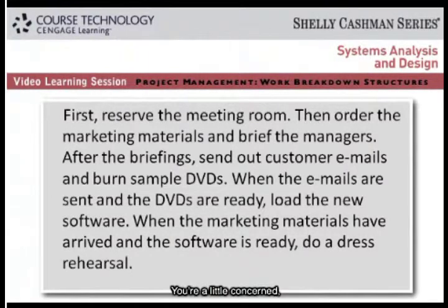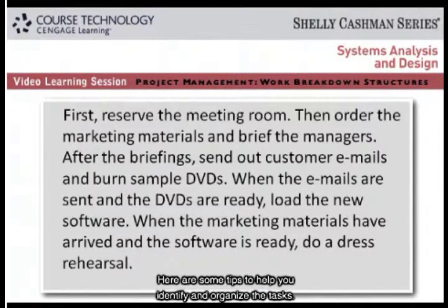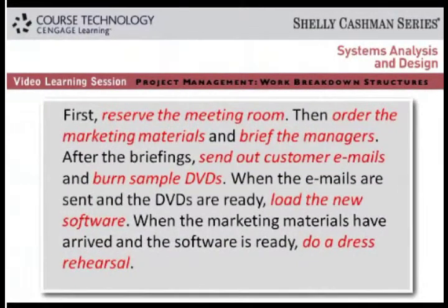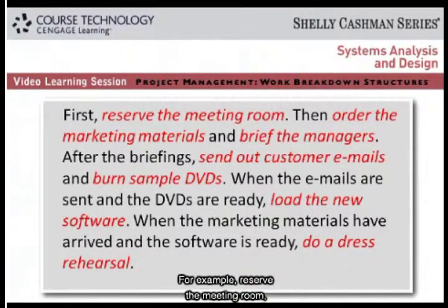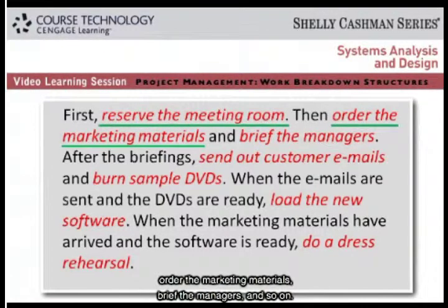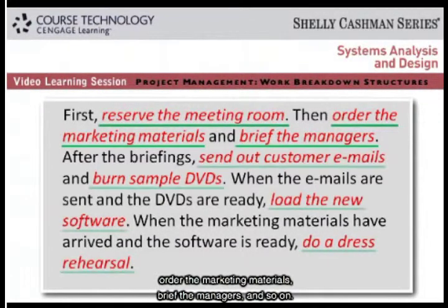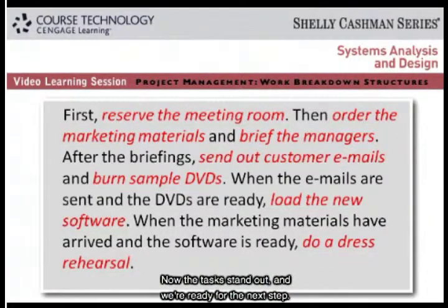It's 8 o'clock. You're a little concerned, because everything seems to run together. Here are some tips to help you identify and organize the tasks. First, highlight the words that describe the tasks themselves — for example, reserve the meeting room, order the marketing materials, brief the managers, and so on. Now the tasks stand out, and we're ready for the next step.